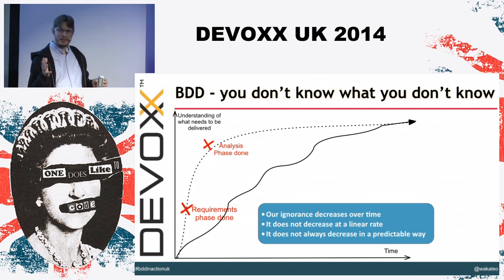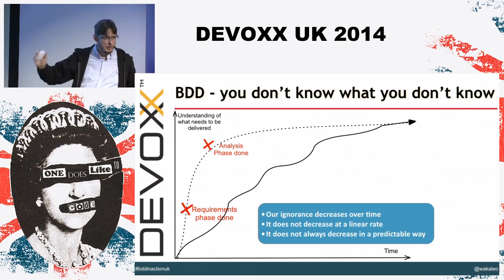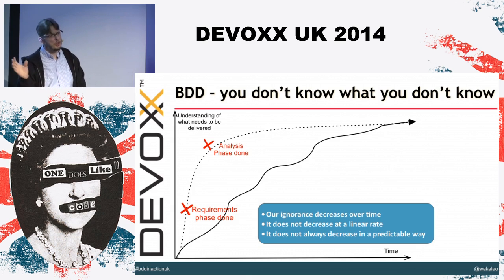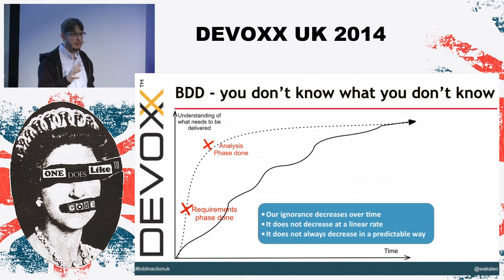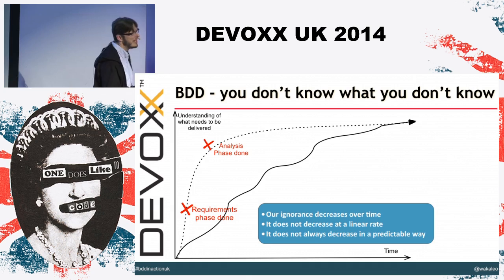And there are some things you can't really cater for because it will just blindside you, come out of the blue. But there are others where you can actually try to investigate and reduce your amount of uncertainty. So when we're choosing what features we want to deliver, we're not only going to try and deliver features that deliver value, but also features that allow us to investigate areas that we're uncertain about, areas that we think there is risk.